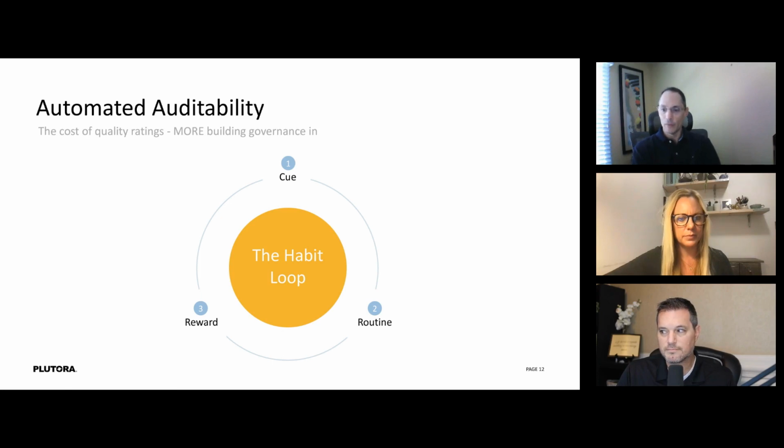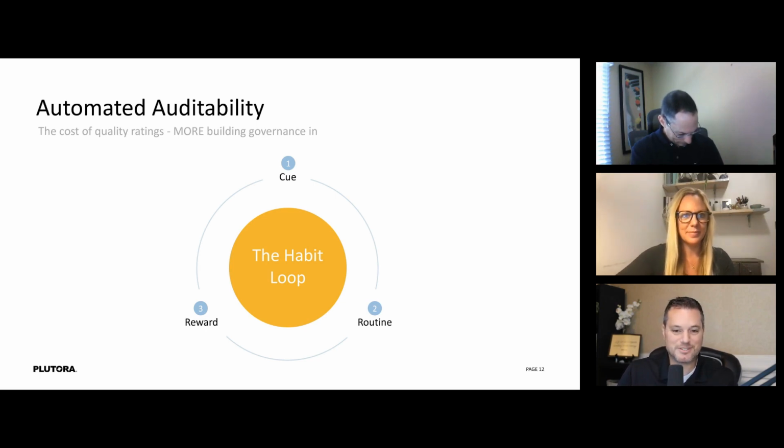I do that a couple ways. One is I look at the size of what's being delivered. The other thing, in all seriousness, is I can look at their track record. I look at the track record of the teams delivering and how many issues they tend to cause when they deliver. I can also manage by exception that way. I know that team A has a higher degree of incidents, and okay, maybe we need to look at some things there. And Vincent, again, I'm a vendor. We can help you with that. We can help you not only get the data, but have dashboards that point you right to a large release and a risky release versus the others.